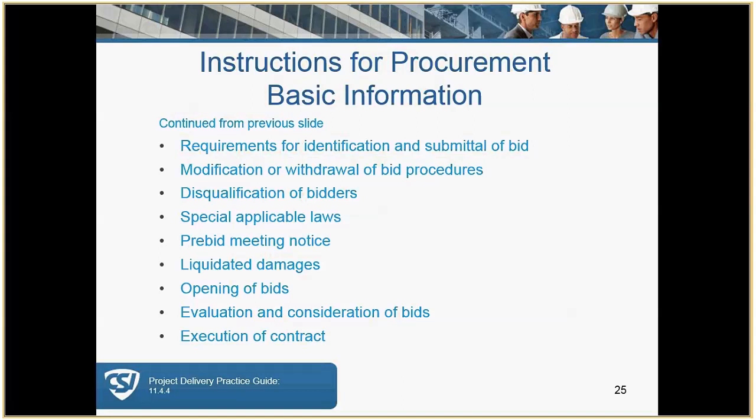normally to be included. Keep in mind that all these are critical instructions that must be followed by the bidders, especially on a publicly funded project in which you cannot allow for any irregularities in the bid. If these instructions are not followed, then the bidder may be deemed non-responsive and the bid disqualified. Keep in mind that, yes, it is complicated. You do need to have all these items in there. They're there to protect both the owner and the bidder.